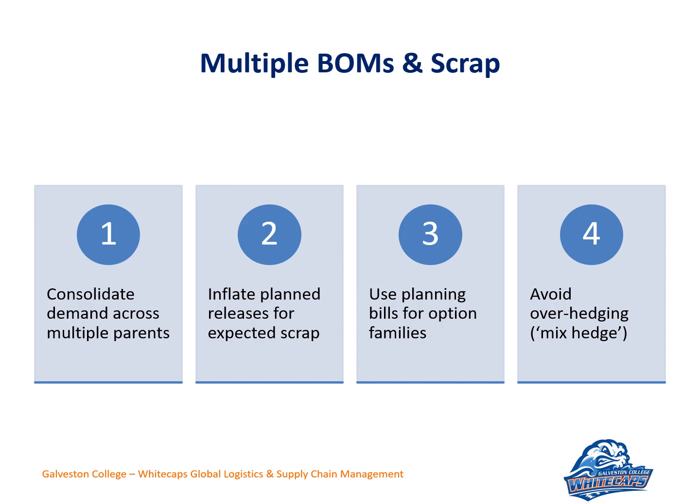And when you have multiple BOMs and scrap, well, what do you do with that? What do you do when several products share a component? MRP needs to sum all these needs into one schedule, so your suppliers see one unified signal. I mean, it's one order, right? It's not a bunch of orders broken out over several products.